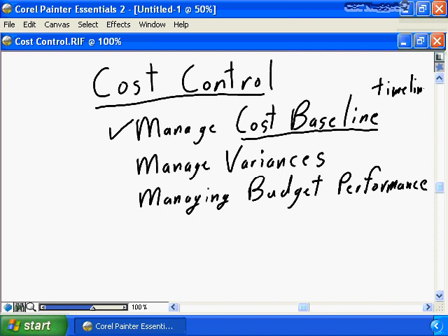As we discussed in the previous nugget, you can be in as much trouble as a project manager, and I've been there, let me tell you, delivering the project on budget but not meeting the cash flow analysis, surprising the accounting department with a bill for $20 or $30 or $50,000 in a month where the cash reserves and the cash management plan weren't in place, simply because you accelerated the project, simply because you brought in an expense to your project a month or 2 or 3 months earlier than the original cash flow plan. So managing the cost baseline is all about ensuring that you deliver on budget and that you deliver to the terms and conditions of the cash flow plan.